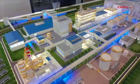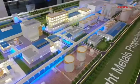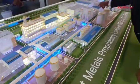Whereas when we went to China, over the last 30 years, there have been 60 plants built in China. Of those 60, 41 have been built by an engineering company called East China Engineering Science and Technology. So they've built 41. They've operated quite a significant number of them, and they always transfer them to the ultimate owner. So when they came on board, the whole FEED, the whole detailed engineering design, just put everything to settle and fix and start, because now there was certainty around how the plant was going to be built.